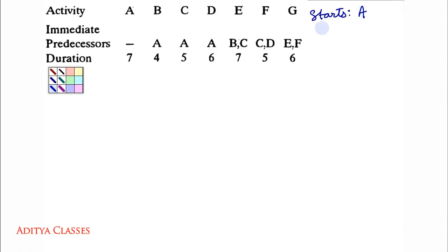Then who will end my network? All the activities that are not in this predecessor list. They all will end. A is here. Then we have a B, C, D, E, F.